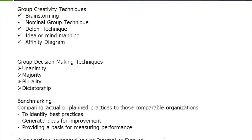Nominal group was basically brainstorming, and then after that you put a score or weightage to each of those ideas and then prioritize them.